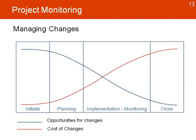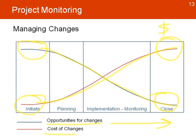We also need to consider making changes to the project when we see variations or opportunities to improve. There is a difference between the opportunities available for changes and the cost of those changes. At the beginning of the project, there are high opportunities for changes because the cost is low — changes are being made on plans. As we make progress, these curves reverse, so near the end of the project, the cost of changes will be higher and there will be fewer opportunities to make them.